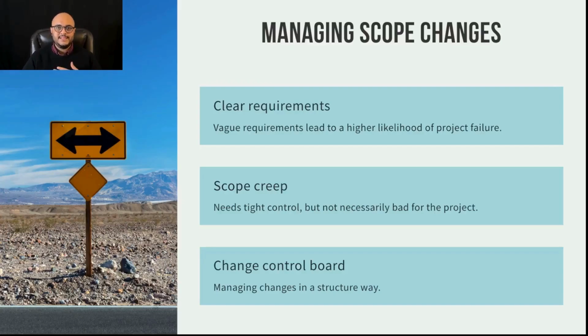Now, scope creep is not always bad. There are certain things that if you add them to the scope of the project, they may save you a lot of time later on. Hey, you know what? It might actually cost us a lot less if instead of upgrading the code that runs this pump, we just replace this pump. Because I know that in future there's going to be a project to replace this pump eventually. So instead of taking on all that cost later on, it's going to cost me very little to simply add it to this project. Very arbitrary example.